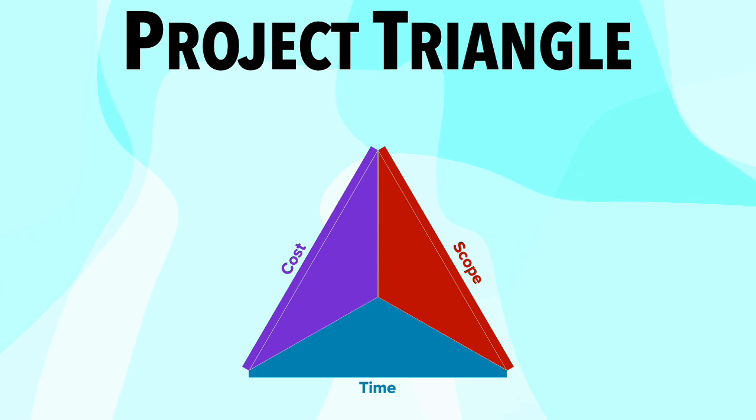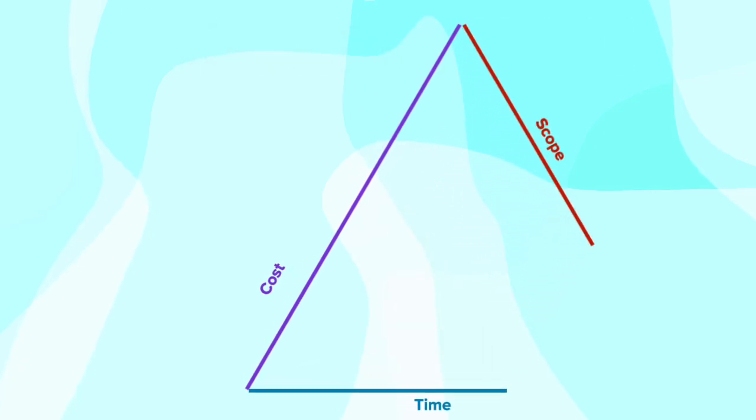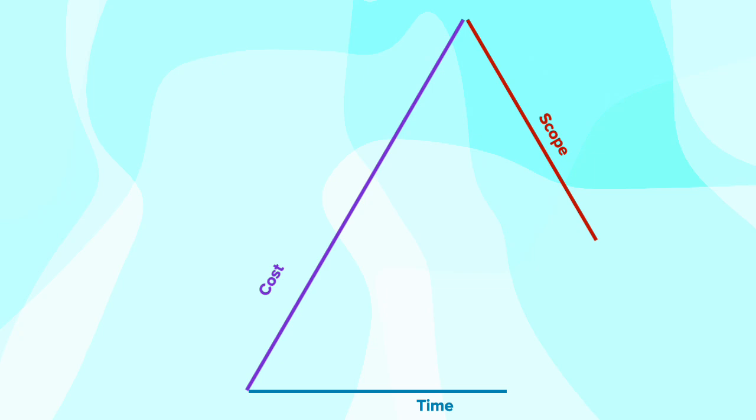So, for example, and this is where the project triangle gives us a visual tool to think through how to navigate project management. If it ends up that the cost of a project is much more significant than we expected, then there has to be some sort of sacrifice from one of the other two remaining parts of the triangle.